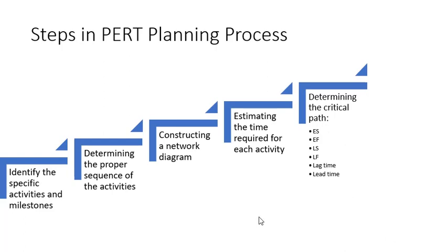These are ES, that is earliest start time, which refers to the earliest possible point in time on which the uncompleted portions of an activity can begin. Based on the network logic and any schedule constraints, the early start date or early start time can alter as the project progresses and changes are made in the project plan.